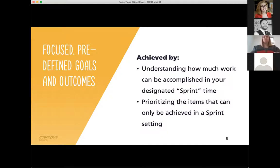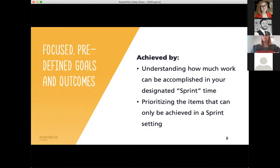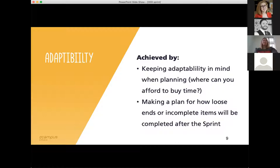It's worth determining not just what you want to accomplish during a sprint, but what can really only be accomplished in the sprint setting. Those priorities are the items you should dedicate the most time to, though that's not to say other items can't get done. Having authors read each other's chapters before the sprint allowed for a fruitful discussion during the sprint about final edits. There might be some items you can plan to accomplish after the sprint, but add to the agenda if there's time — at our business sprints, one group finished their ancillary resources early and got a head start on editing another group's work. Identifying your priorities allows you to be adaptable without compromising the main work.